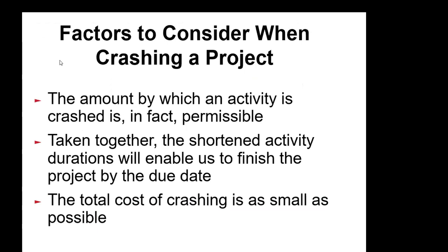Factors to consider when crashing a project. The amount by which an activity is crashed is, in fact, permissible. Taken together, the shortened activity durations will enable us to finish the project by the due date. The total cost of crashing is as small as possible.